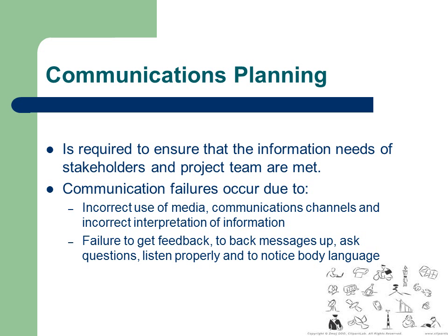Within any project, effective communications don't just happen. They are planned and implemented in a structured and clear manner. It's important to define all the stakeholder groups and determine the interactions between them. Sometimes a communication network diagram can be useful. Refer to Appendix A on page 8/23 of your UNEP textbook for examples of communication network diagrams.